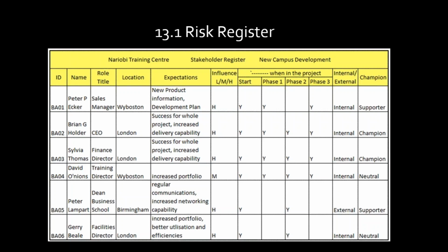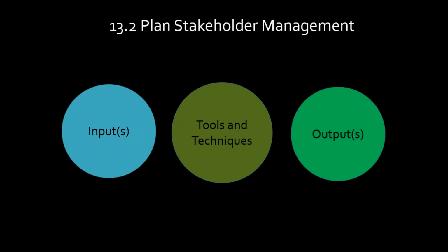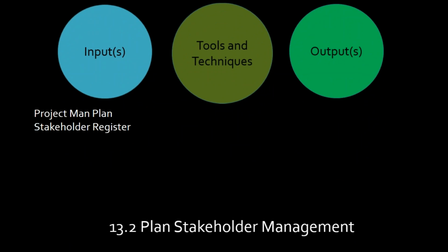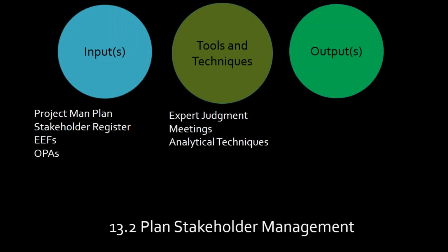Here's where it starts, though, when we talk about stakeholder management. So let's look at the dot 2 in this case, which is really a dot 1 in disguise, right? So the project management plan, and again, that's whatever state it's in, and anytime we're running a process, the stakeholder register, which is really the key input to this process. And of course, we have to worry about our organization and the culture of our organization. And this goes even beyond, let's say if our stakeholders are outside vendors and even outside clients paying us. We really have to take all of that into consideration.